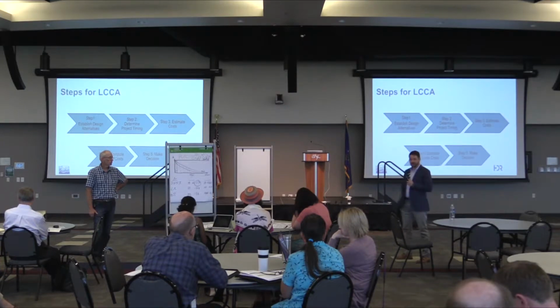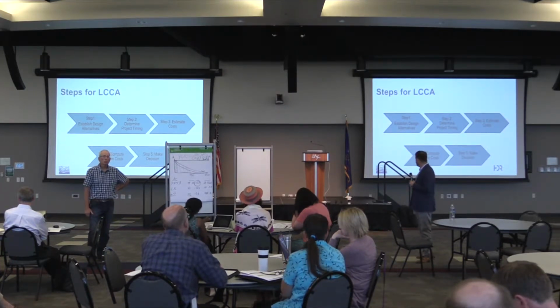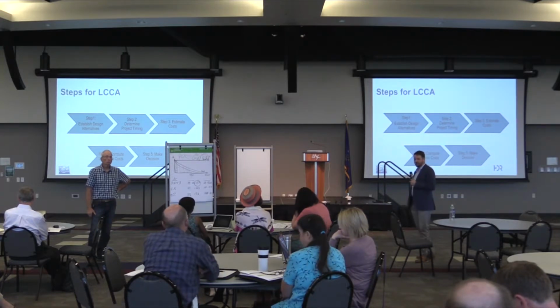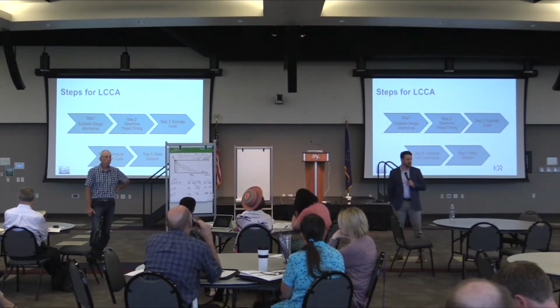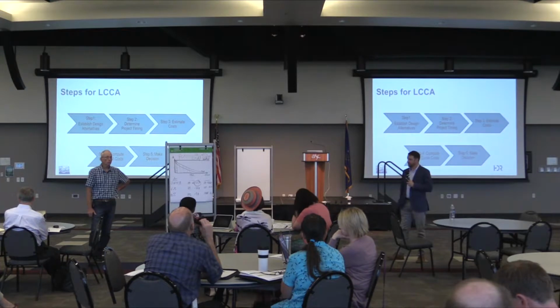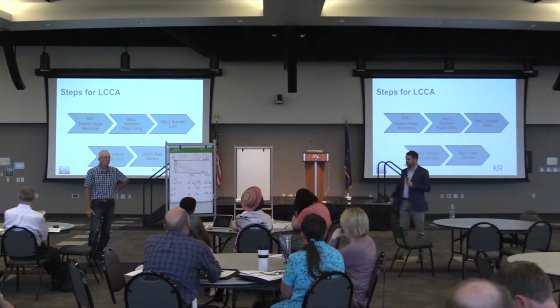Then the next step is to compute what those life cycle costs are for each of the alternatives. And then you make a decision. So you compare all of the alternatives, look at the least costly alternative, and that's the one you want to go with.